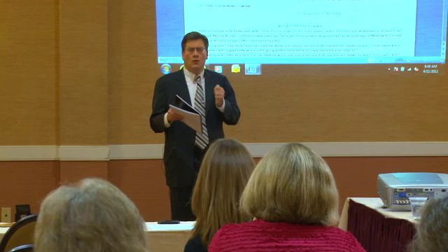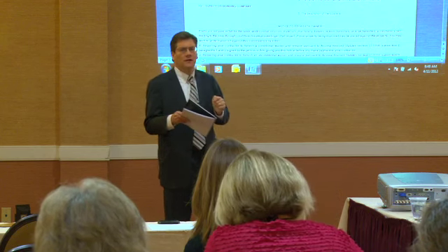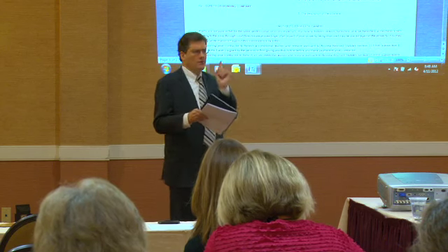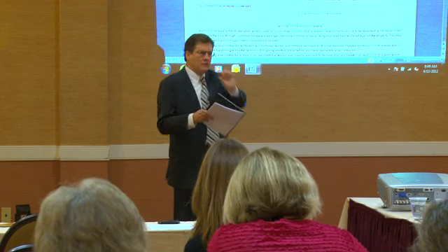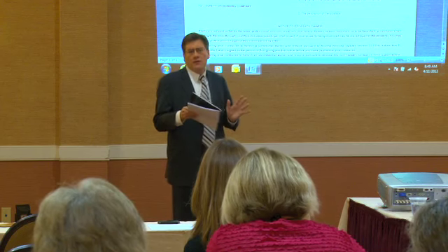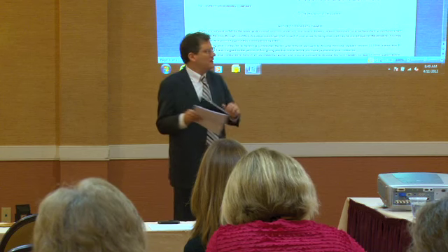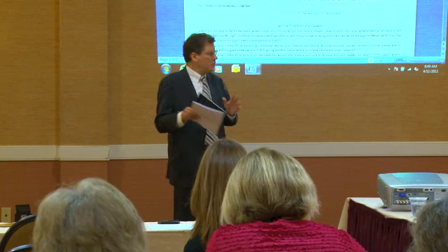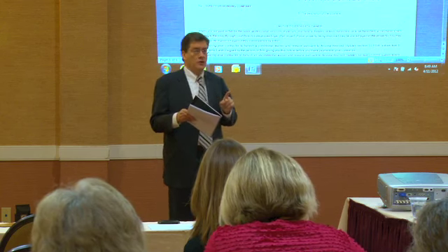We sent out what we called an amended preliminary notice. Okay? Amended because if there was, for any reason, we wanted to reach back and get the benefit of the January 21 preliminary notice, we wanted to have that option by saying it was amended. Let's say, for some reason, we had typographical errors on the second preliminary notice. If we're saying it's amended and we got it right the first time, then you've got a little more maneuvering room.